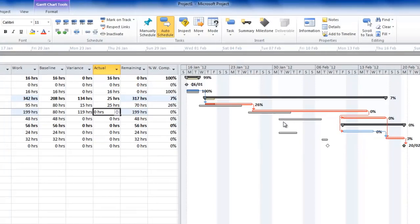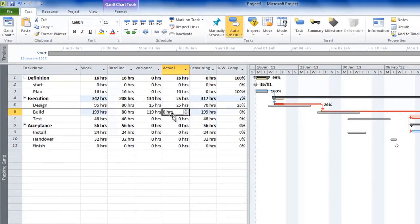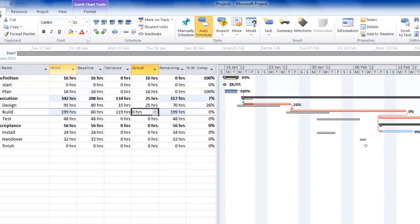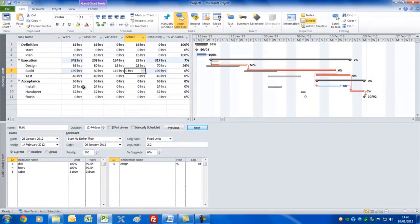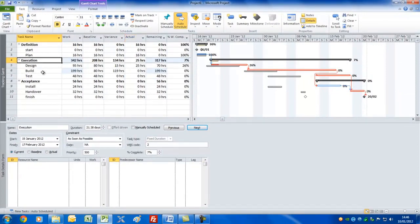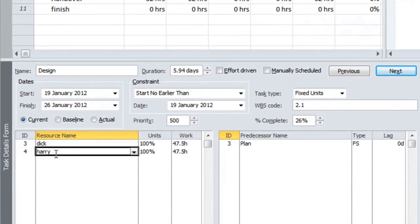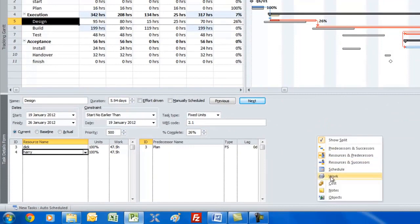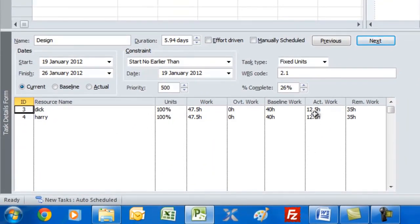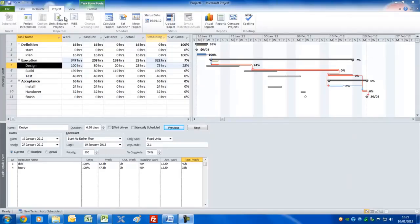We can look at remaining tasks and work out how to bring the project back on track by applying more resources. An important view is to click Details on the Task tab — this splits the screen in two. The bottom pane shows who's assigned to whichever task you select above. If we click on Design, we see Dick and Harry. Right-click in the bottom pane and choose Work to see and edit actual work and remaining work per person per task.